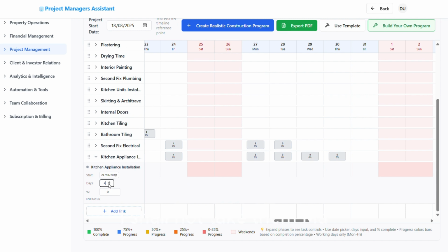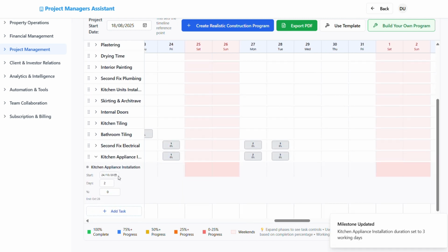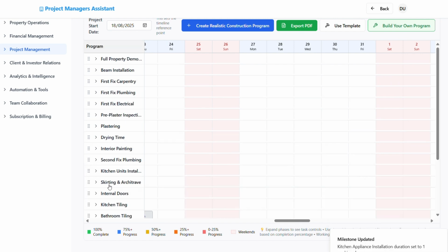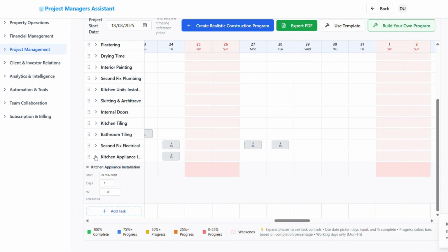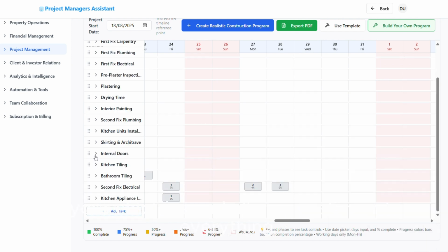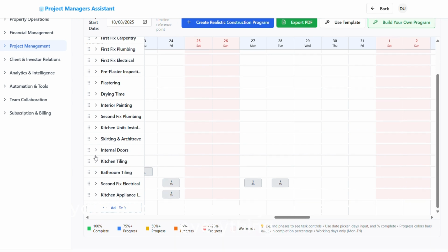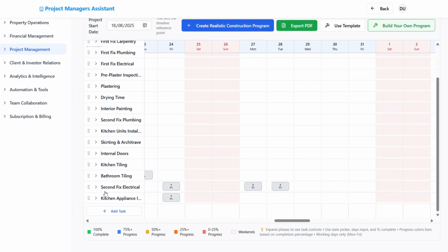It should only take them a day to get that sorted out. So at least you should now have all your electrics and all your water on to everything. You can check if there's any faults anywhere. You can get walls dug out, chopped out, if there's any cables that have been buried over, and it can all get plaster patched up, ready for the decoration. And then you can see if there's any leaks, so we can get it all sorted out before the decorator goes on, and then we don't end up with stains everywhere.